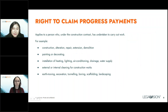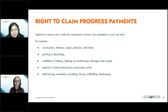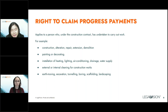SOPA applies to anyone that carries out works under a construction contract. This includes not only people who physically work on construction sites, but also suppliers of materials and consultants. The works covered include building works like demolishing and rebuilding structures, smaller jobs like installation of lights and other fixtures, cleaning, painting and decorating. It also covers external works like excavation, tunnelling, scaffolding, as well as landscaping.